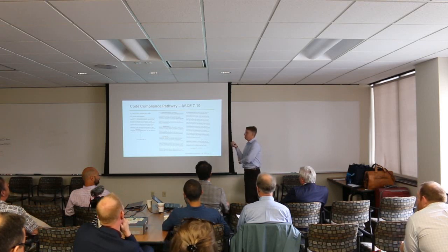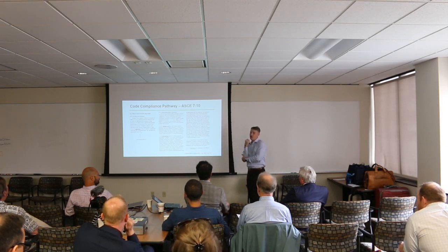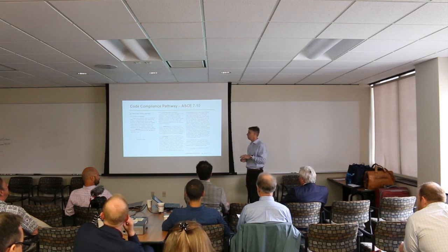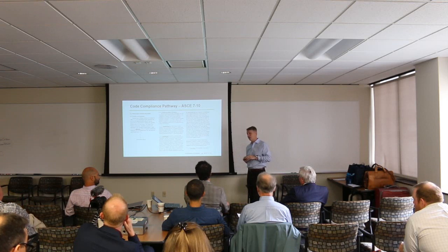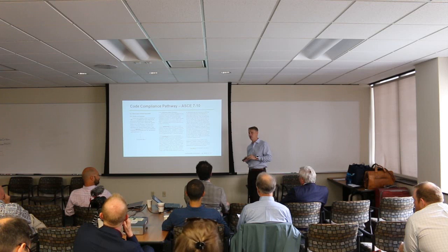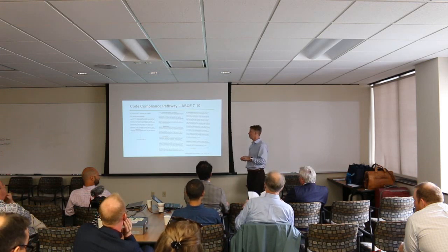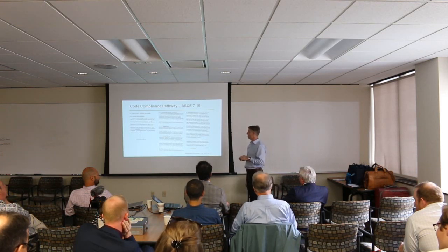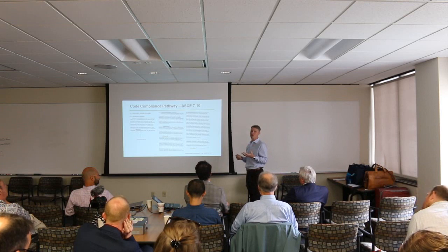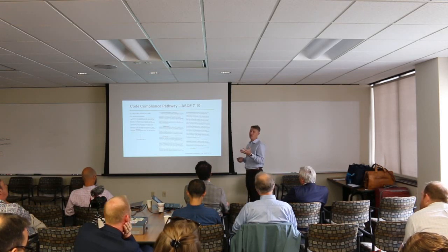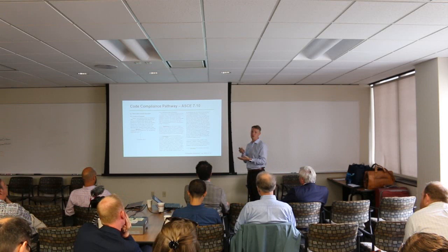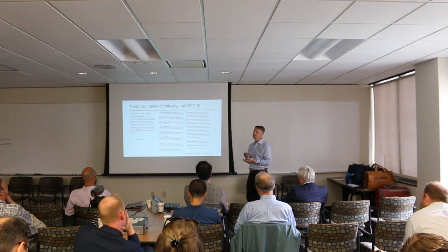City of Portland, same thing was happening. So that's where I went to the state. And with my work with the governor's office, there's a process in the state of Oregon where you can actually permit the projects through the state, not the city. Those are the first projects in the history of Portland permitted in the city of Portland by the state, which upset some things, and I got a book thrown at me by one of the city officials. But that's why we have an 8-story and a 12-story, and now the city of Portland has done a 180. They're asking, how do we start doing these peer review performance-based design projects?